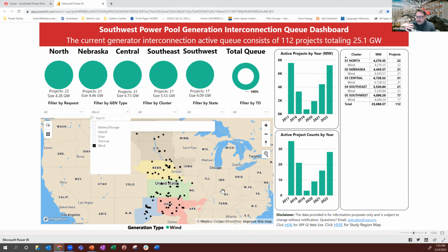And then it goes from that phase to getting a spot in the interconnection queue, and then to getting it all approved by the county and the city. And then once it's all done, maybe if they sell the power, it gets built. In all those steps, it can stumble. So there's probably a dozen, maybe 24 projects proposed for every one that gets built. So I would say this is a proposed project.